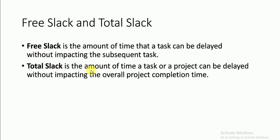Free Slack is the amount of time that a task can be delayed without impacting the subsequent task. Suppose we have multiple tasks and the tasks are dependent — we have a dependency between the tasks — then Free Slack will let you know how many days we can delay a task so that the next dependent task should not be delayed. That is the Free Slack.